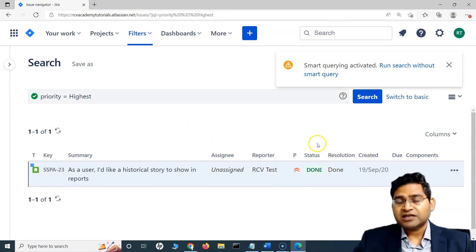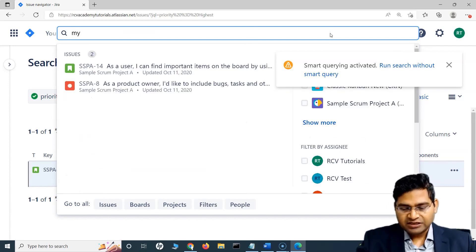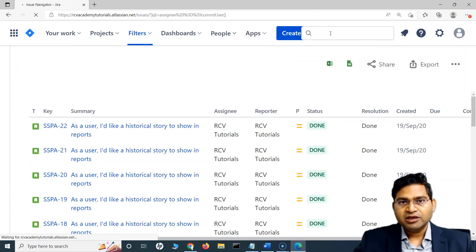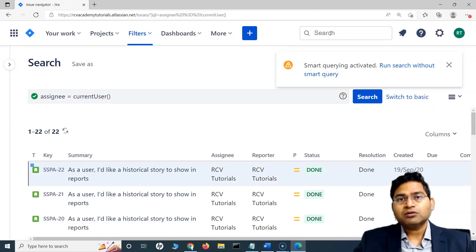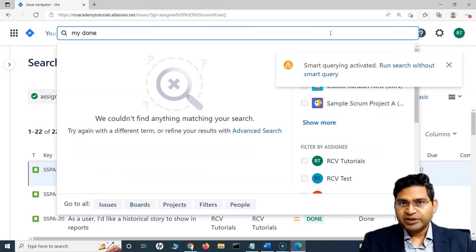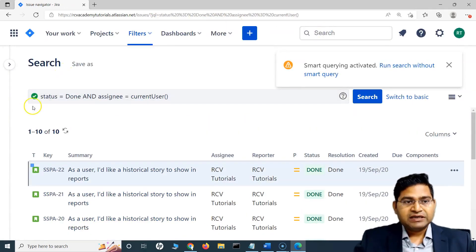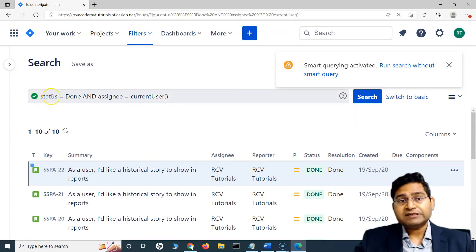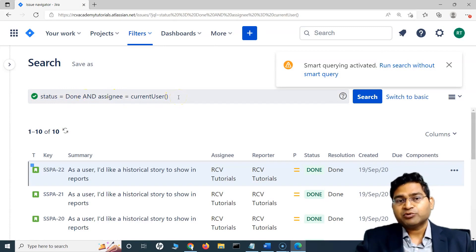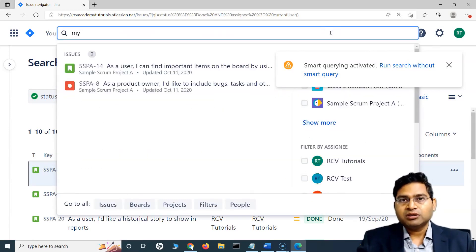Not all fields are mapped, but there are some fields that are. Now, if we want to get all the issues assigned to myself that are also completed, I can say 'my done'. When I type 'my' and space 'done', 'my' gets associated with the current user and 'done' gets associated with the status. You will see that it automatically formulates a query: status is equal to done and assignee is equal to current user. So 'my done' shows me all the issues completed by myself.